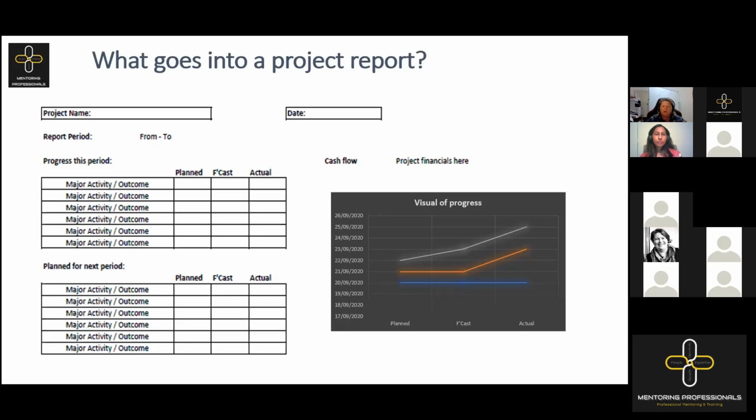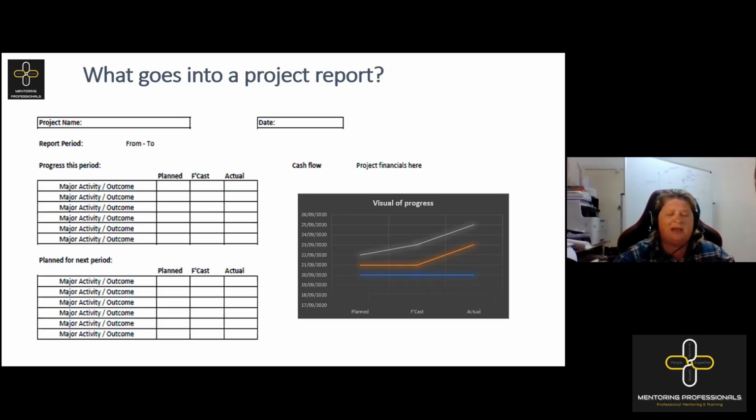How do you think they monitor all of those thousands of projects? They have somebody which is an audit type role that actually collates all of this information together, puts it in a singular report. And this is where that RAG status comes into play again. Because in that singular report, all those projects and programs at the top are the ones that are all red. And then you are quarterly invited to come along and explain yourself to very senior management about what it is that you're doing to get that project or program back on track.